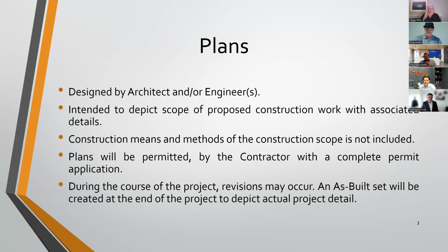I think it's very important, folks, because when you look at the two most common projects that are ongoing in the market right now, either a deck renovation or an upgrade, which Ben referred to recently, you need a landscape architect, typically a lighting consultant, mechanical, electrical, and plumbing designers involved in that process. Not to mention the fact that on a pool deck, if you're making any alterations to the property, that actually has to go through the health department as well, which is another layer of jurisdiction that is involved.